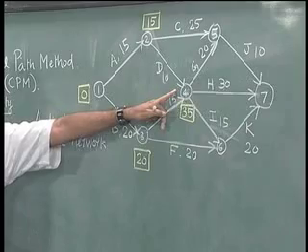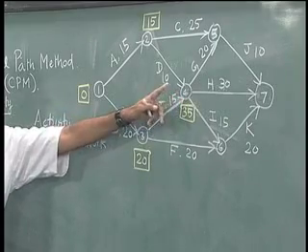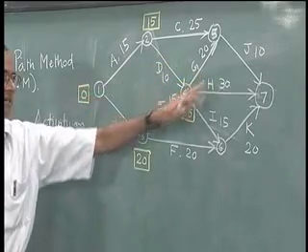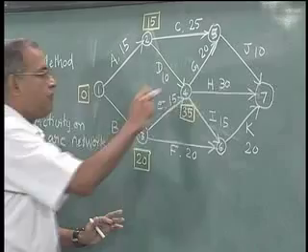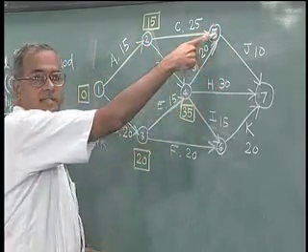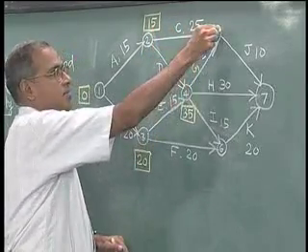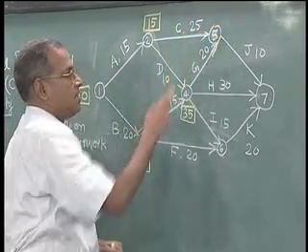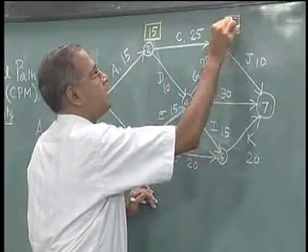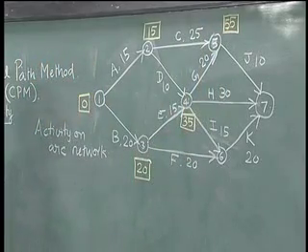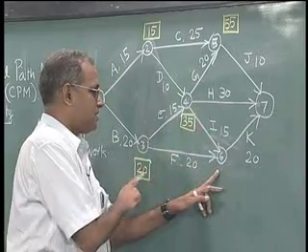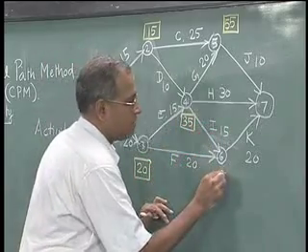We take the maximum because 4 here indicates the point where both D and E are over, such that G or H or I can begin. So, with 4 we put 35 here. Now, similarly for 5, this indicates the point where C and G are completed. So, it is 15 plus 25, 40, 35 plus 20, 55. So, earliest C and G can be completed is the maximum of 40 and 55. So, we get 55. Similarly, this indicates I and F completed. So, it is a maximum of 40 and 50, which is 50,